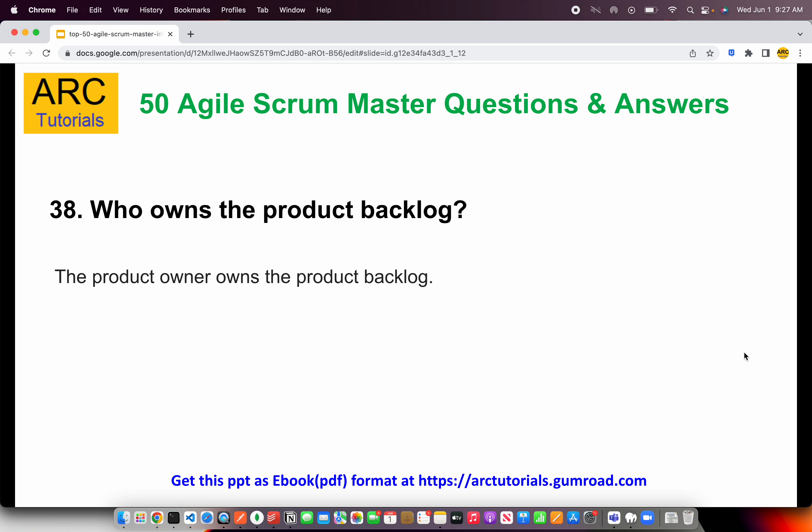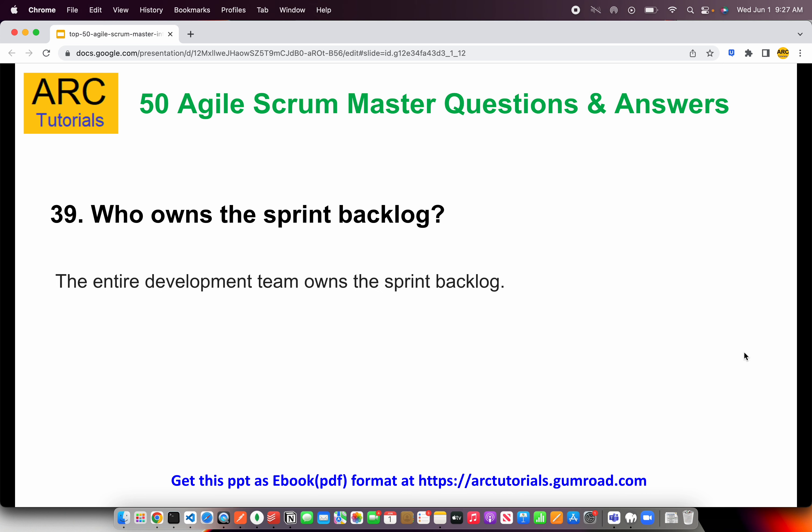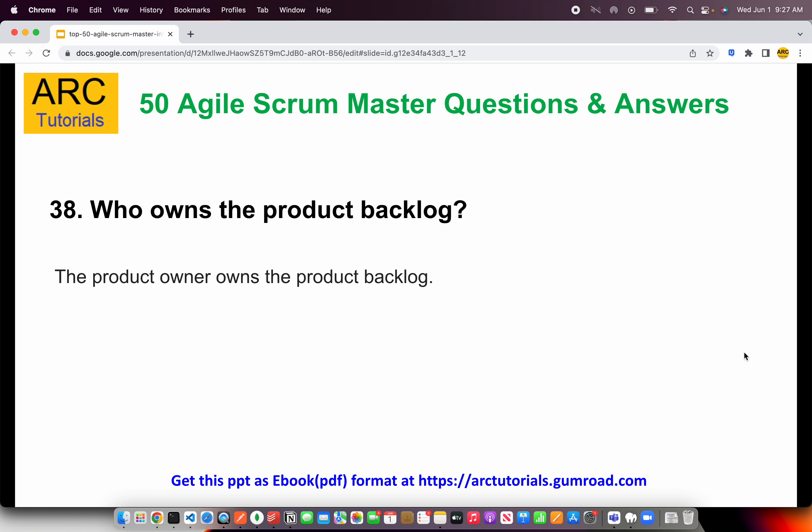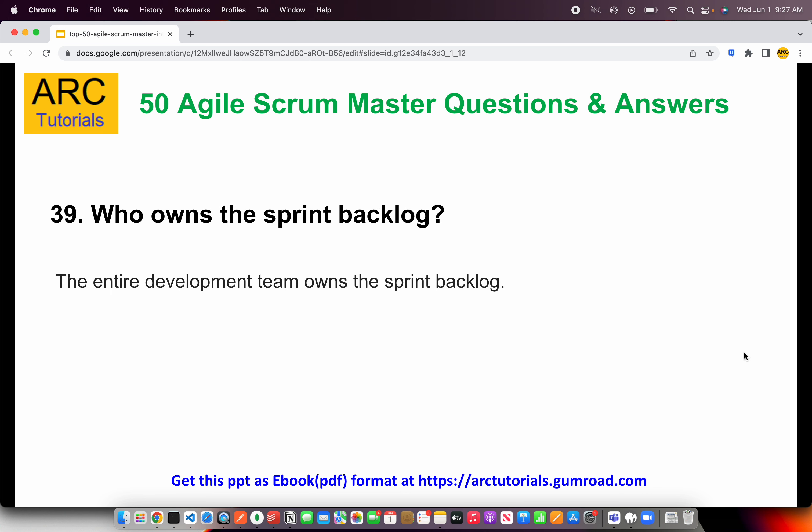Who owns the product backlog? The product owner owns the product backlog — this is an important question often asked to scrum masters or the scrum team. Who owns the sprint backlog? This is a tricky question: the sprint backlog is owned by the development team — the entire development team. Everybody contributes to the sprint backlog. But the product backlog, remember, is owned only by the product owner.